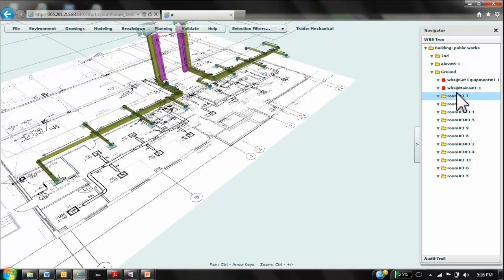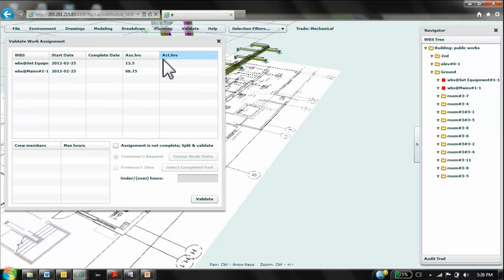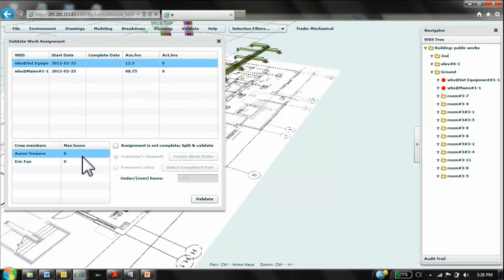Traditional construction projects lack the ability to give the journeyman hours targets on every assignment. This again increases efficiencies by removing the large job syndrome, where the journeymen lack the urgency to be efficient. Once the work is completed, the foreman can mark the work as complete in the system. The system will display how many hours have actually been booked as well as the hours assigned.